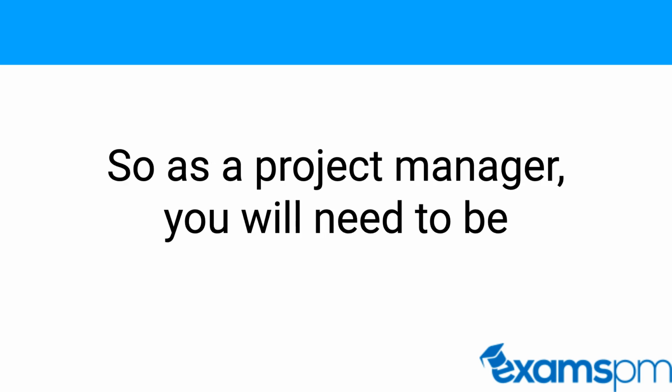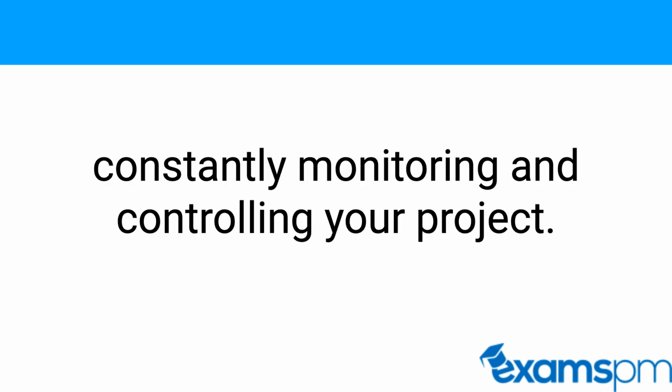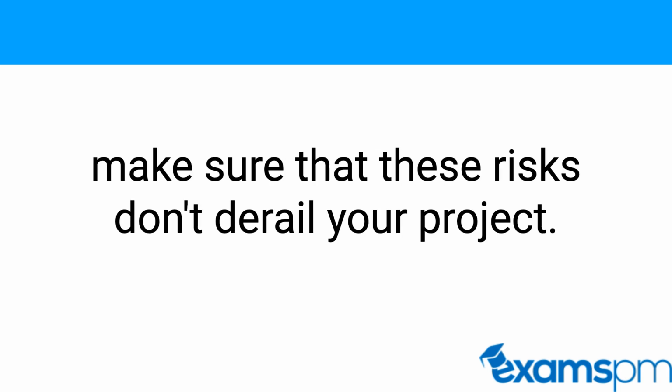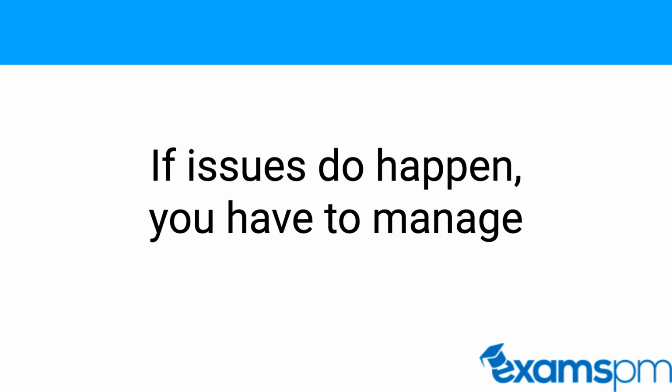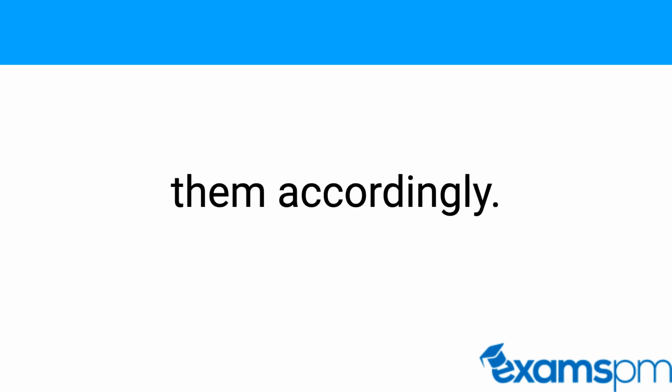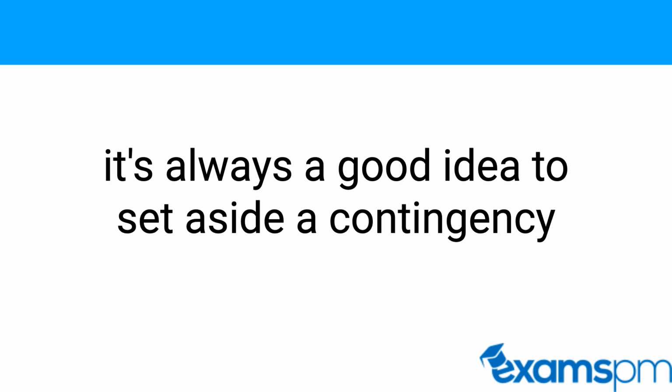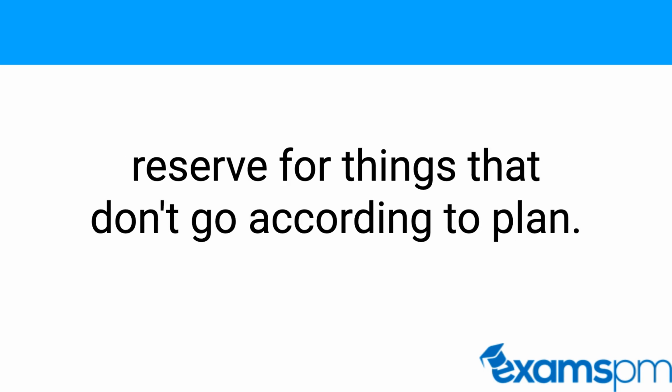So, as a project manager, you will need to be constantly monitoring and controlling your project. You want to identify risk as early as possible and make sure that these risks don't derail your project. If issues do happen, you have to manage them accordingly. When you're setting out your budget in the planning stage, it's always a good idea to set aside a contingency reserve for things that don't go according to plan.